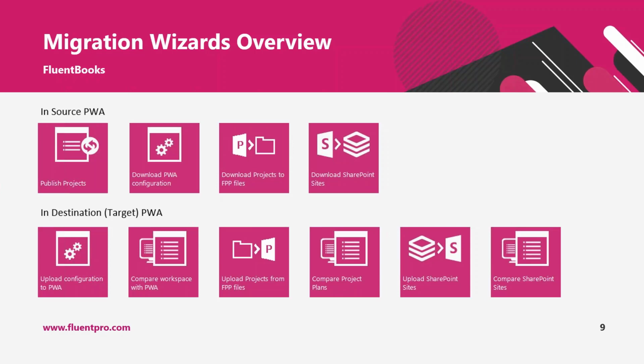So sometimes it makes more sense to compare your downloaded set of data with your target PWA to make sure that everything that you downloaded is present in the target PWA and is uploaded correctly.